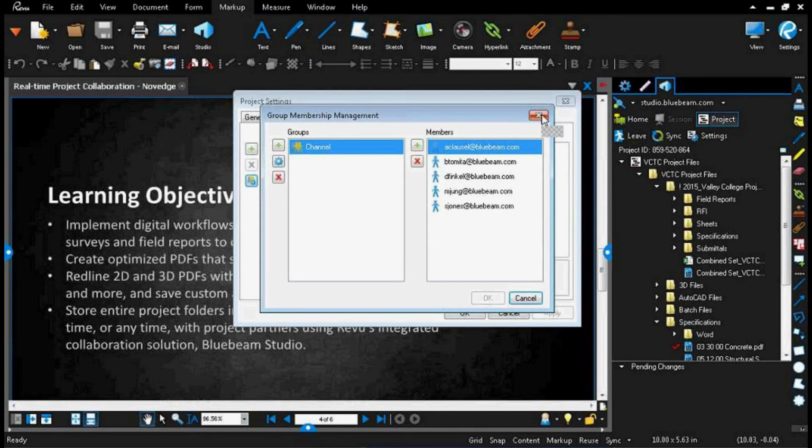For example, you're setting up bid documents, so you want to send out to a number of different contractors or whatever it may be. You can allow certain permissions for a certain period of time, and then at the end of the day, you can cancel out the permissions of the groups that were not awarded the project.